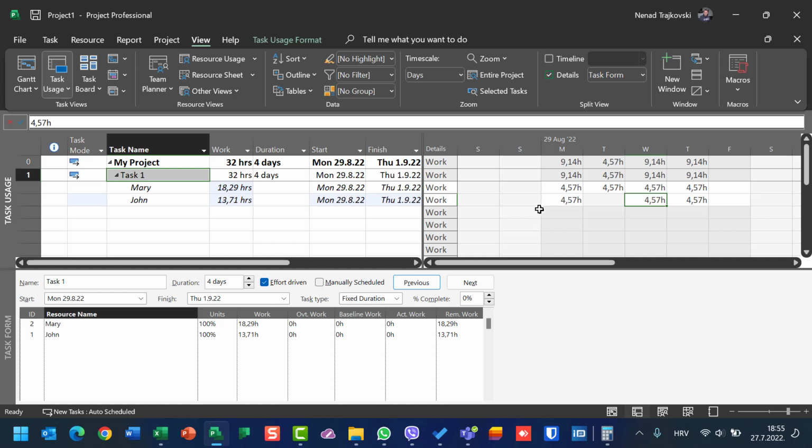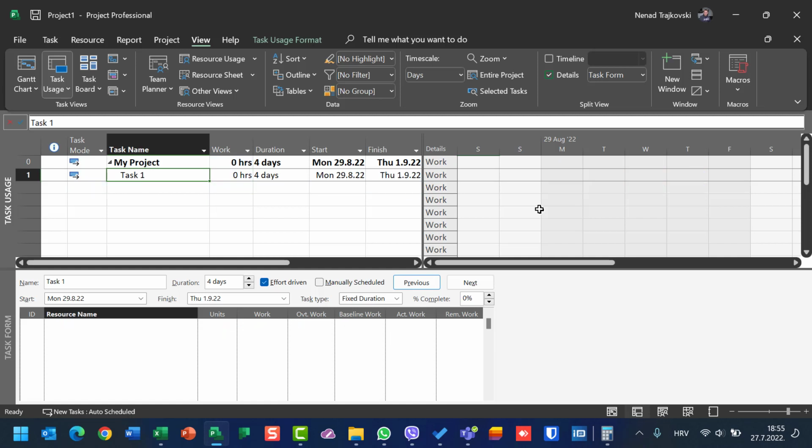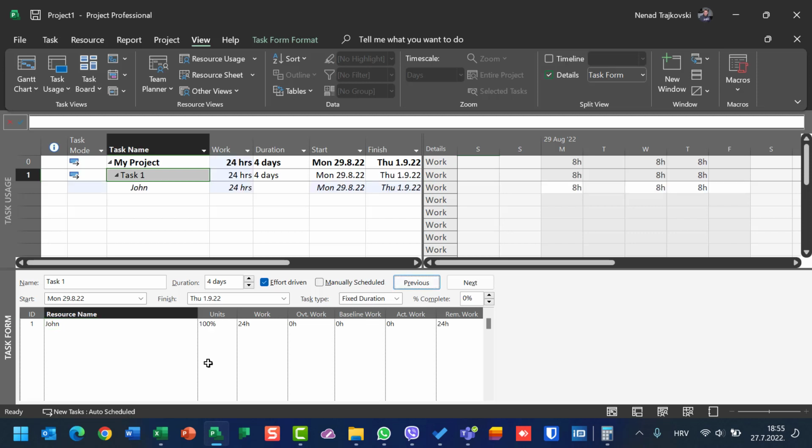And now let me show you in a different way. What if I add John first? Since this is fixed duration, John is going to work on Monday, Wednesday and Thursday.